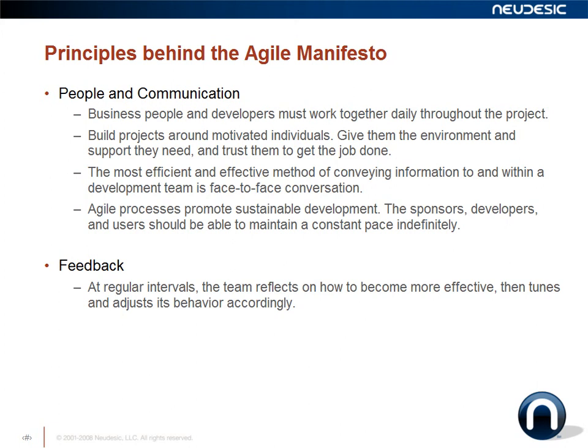In agile, we want to promote a sustainable development environment where you can maintain a constant pace indefinitely. You don't want to replicate the project death march where everyone is working 70 to 80 hours a week for months and months. That original troubled project I mentioned was on a death march for two years — there was no morale, people could not even think or process. In agile, you want to focus on reaching a constant, fairly high pace that can be sustained indefinitely.